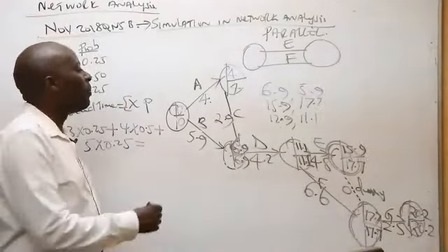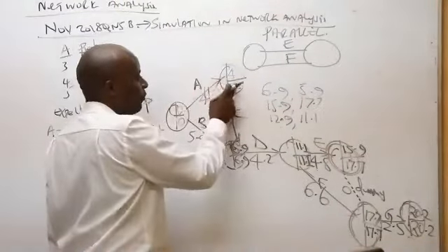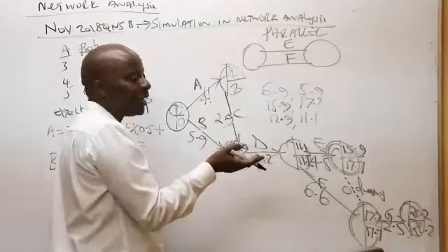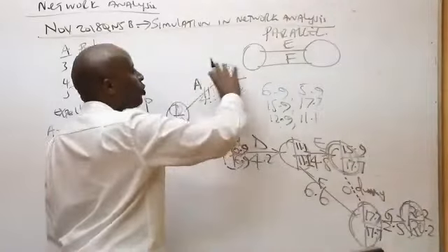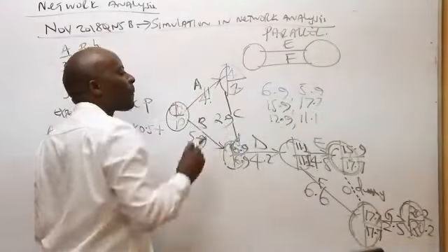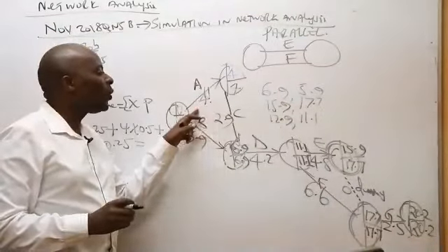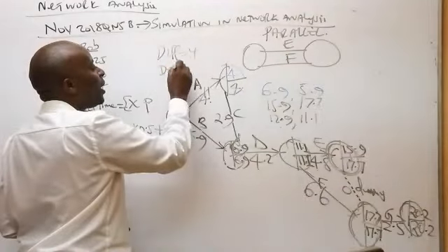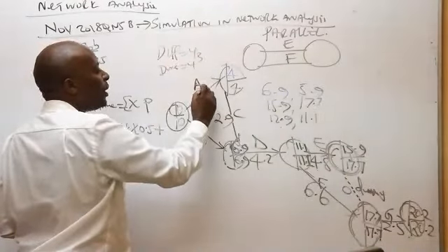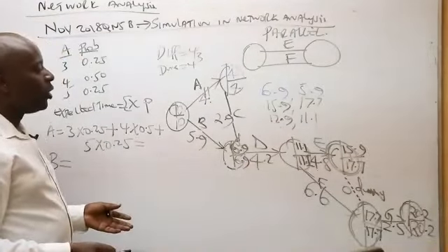Walter is telling me that Mwalimu, mark A. When you ask him why A, because of the similarity. So 0, 0, we have 4, 4. And then when you take the head minus the tail, the head is 4, the tail is 0. So 4 minus 0, we are getting exactly 4. And this exactly 4 is identical to A's duration. So the head and tail difference is 4, and the duration of A is 4. So they are coinciding. So it means that A must be what here? Must be critical. Confirmed.